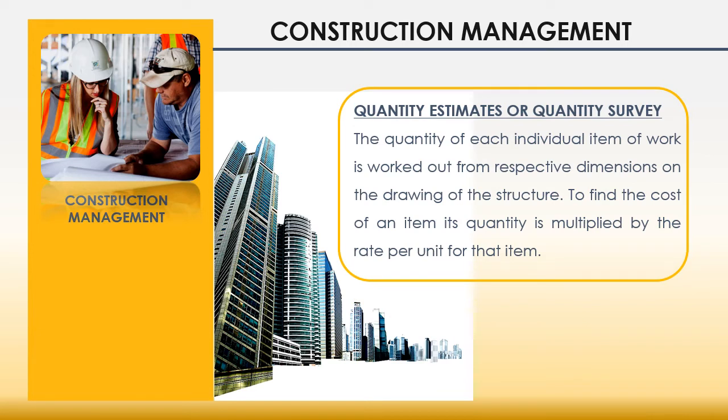Next one is quantity estimate or quantity survey. The quantity survey is essential to estimate, before the construction starts, the probable cost of construction for the complete work. The construction cost includes cost of materials, cost of transportation, cost of labor, tools and plants, etc. The estimate is required in inviting tenders for the works and to arrange contract for the complete project.